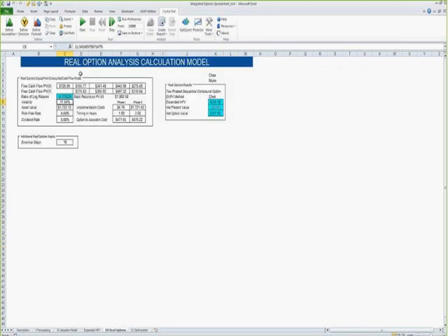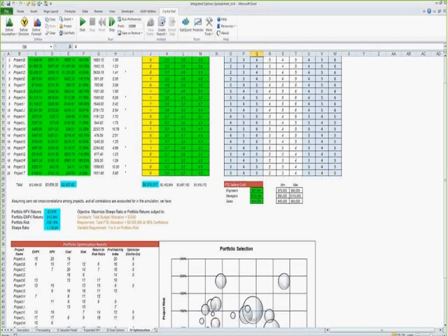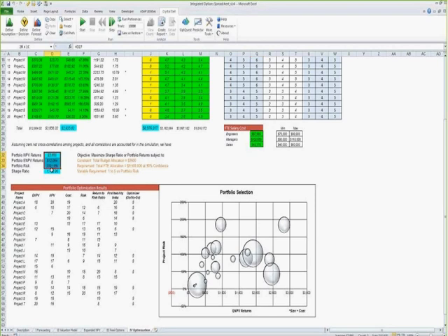All this fits into our project, where we have different methodologies for calculating, and this is where we want to be: our portfolio model. We're just assuming that all these other projects or other things we're working on in the business have come out of our EPPM, and we're simulating them side by side with this specific example that we have over here. Here we might have assumptions about how many people we can assign, with min-maxes around the kinds of resources, and then it will produce what has the highest return in a bubble chart.